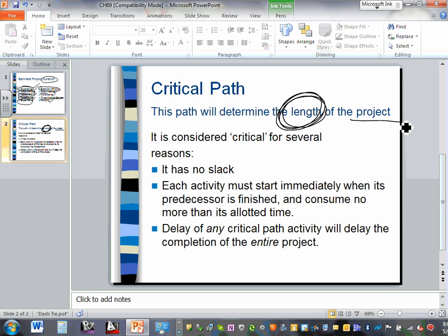So now, knowing this, Derek, knowing that you need 20 weeks, what do you think as a project manager you would do? If you know that you need 20 weeks to finish the project, think about it. And each one of them is 10. What would you do? Come up with a solution. Now remember, you have resources that you can utilize. What would you do? How about adding another person to work with you? They call it relieving the critical path. I know that the critical path is going right through you because you need the longest to do it.